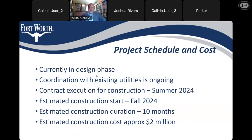This is the project schedule and cost. We're currently in design between 60 and 90%, coordinating with existing utilities for relocation. We expect to execute the construction contract next summer — summer of 2024 — and then 4 to 5 months after that in the fall, we'll start construction. So about this time next year we'll be starting construction. We expect construction to take about 10 months, and the construction cost is approximately 2 million dollars.